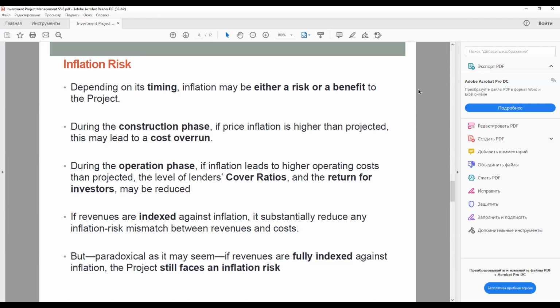Most of the construction phase costs should not be vulnerable to inflation-based increases. The major line items, the construction contract price and financing costs, should both be fixed. In preparing the construction phase budget, however, an allowance has to be made for inflation over the construction phase in costs that are not fixed, such as the project company's general personnel costs and purchase of any items such as spare parts not included in the scope of the construction contract.